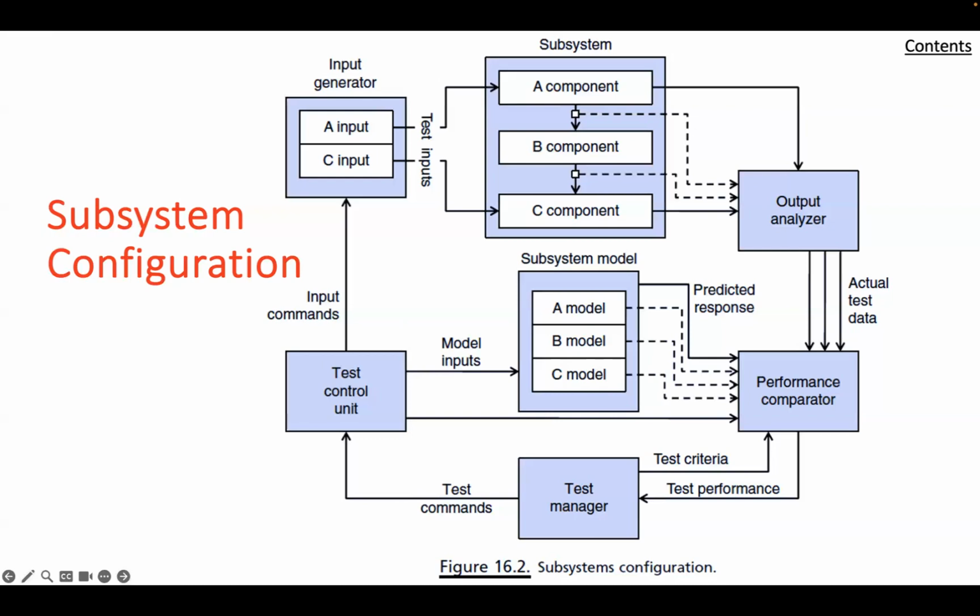As each company or sponsoring organization is in charge of their individual system, there will likely be additional coordination between the system efforts in order to get the system of systems fully functional as the integration phase progresses. Funding for individual systems, if not provided by the system of systems effort, may affect the rate of change and responsiveness of each individual system in order to satisfy their integration obligations.